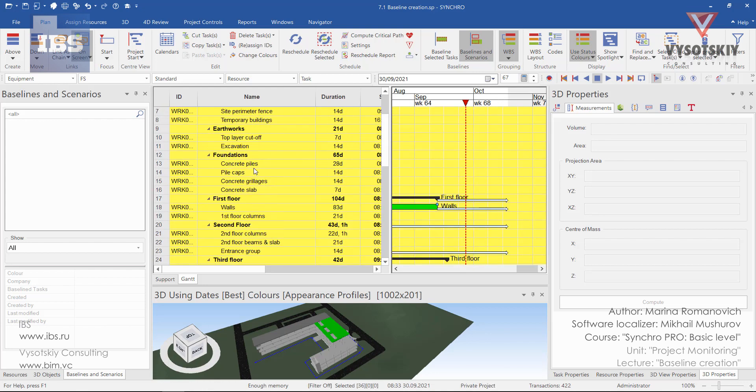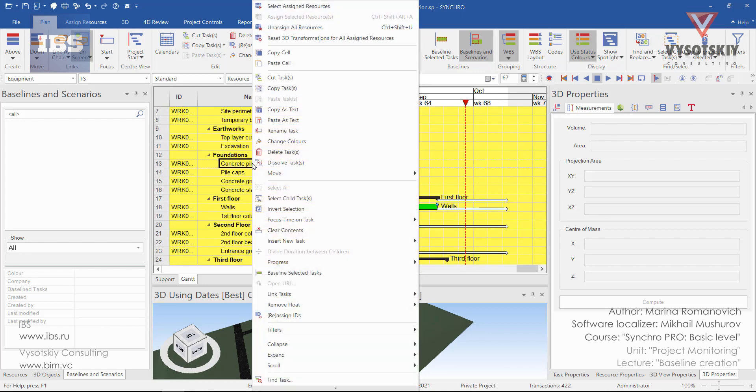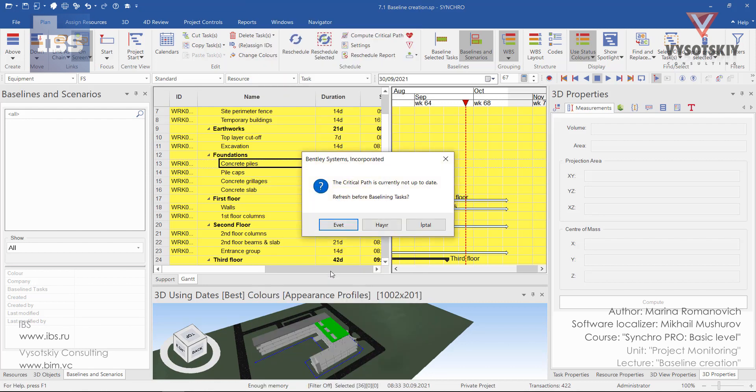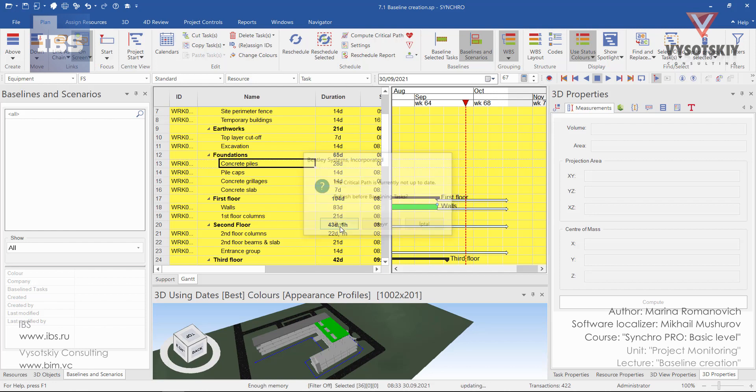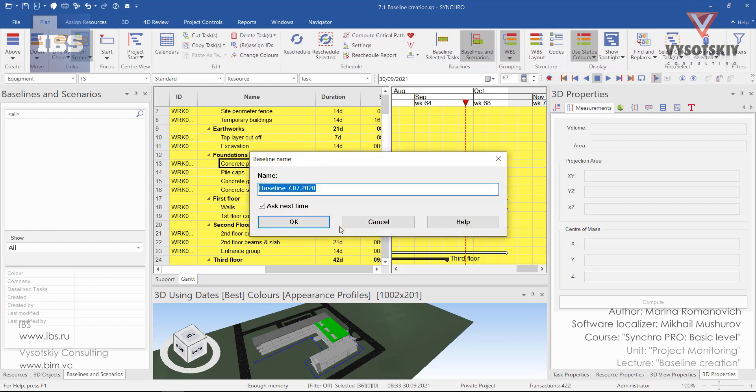We can right-click again and then select baseline selected tasks. Synchro will notify you that critical path is not updated, so we would like to refresh it before baselining. Let's rename it, let's say it's baseline main.